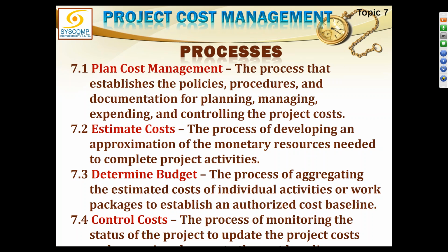So now is the stage when I am the project manager. I have been assigned this project and the project sponsor has asked me to plan, and now I am planning the cost. Naturally, the schedule also is being planned at the same time. And as I said, cost estimate, resource estimate, and the duration estimate all are happening simultaneously. So at this stage, I have to come up with a detailed estimate, which is called a bottom-up estimate, and this is the maximum detail one can go to in presence of whatever kind of uncertainties are there in the project. This is the maximum detail you can go into.